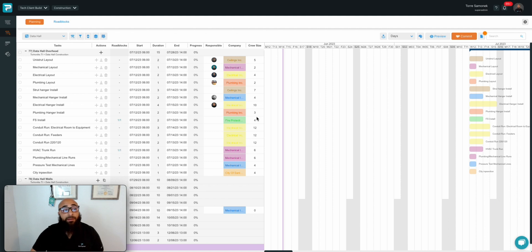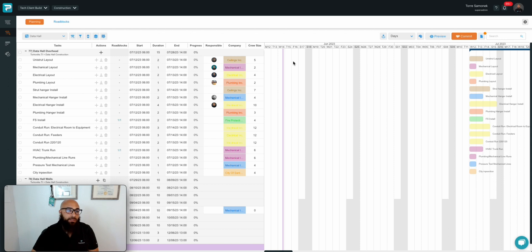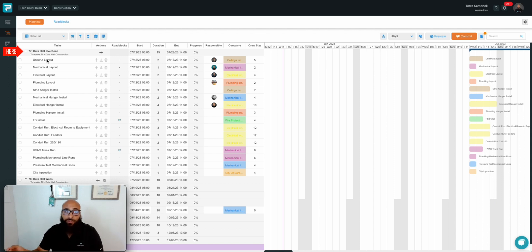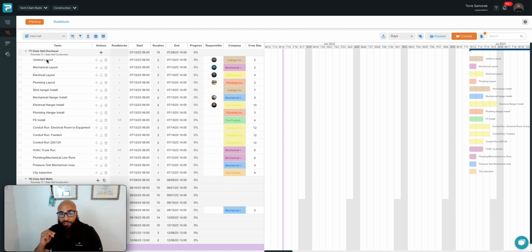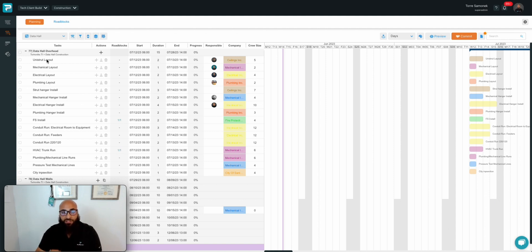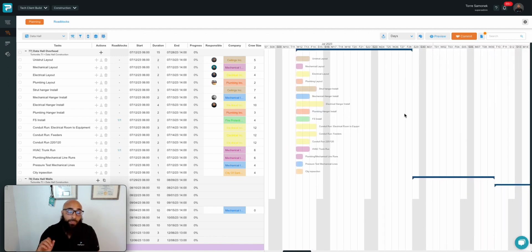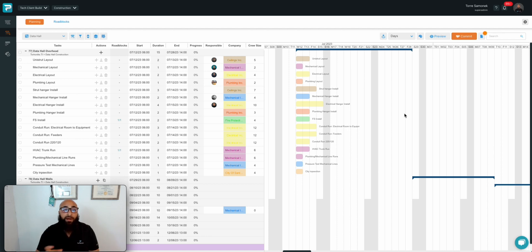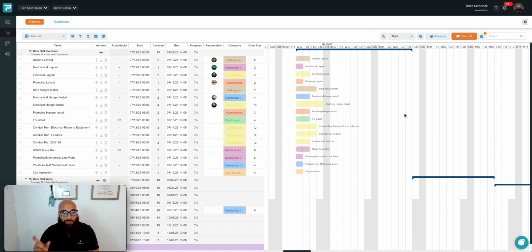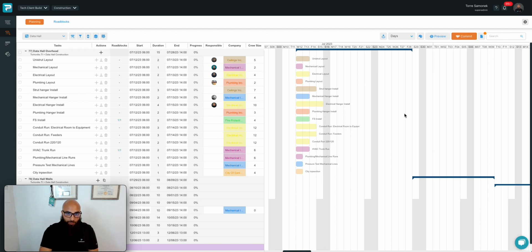The second part of step one is identifying the tasks. In ProPlanner, it's really easy. At any activity, in this case line item 77, data hall overhead, you can break that activity down into as many individual tasks as necessary to successfully complete that installation of work. In this case, we have a good group of tasks. Now, in pull planning, from my experience and the experience of our clientele, a large portion of time is wasted when we don't already have these tasks identified prior to starting the pull plan.